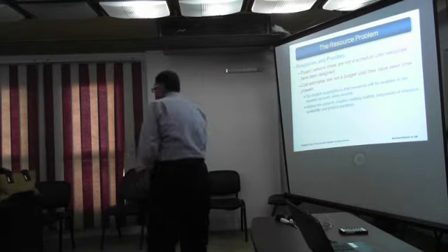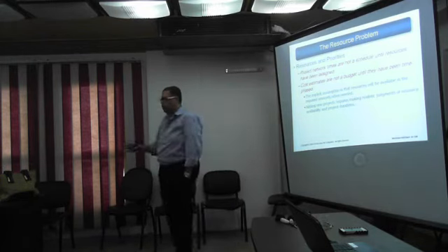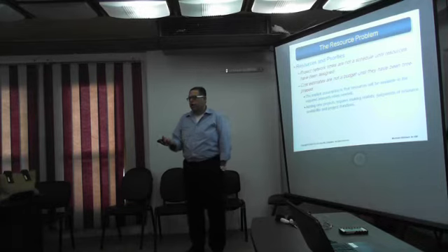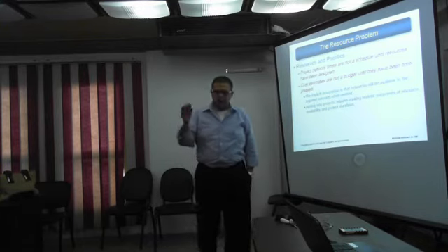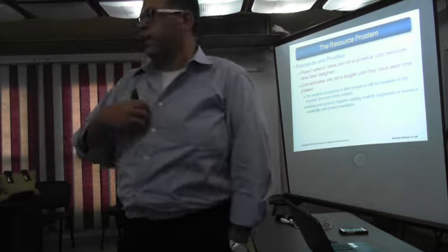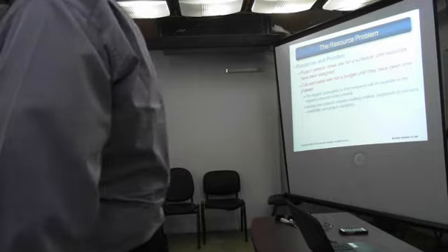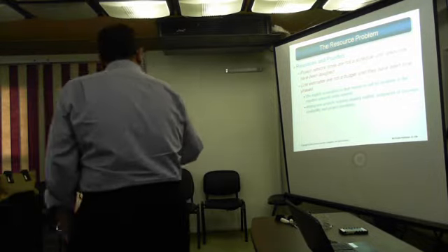I'll assume that all the resources needed are only people. Okay, for example, basically you need to have your schedule. Your schedule means that you have a lecture today at 10 a.m. Okay, if you know that the lecture is today at 10 a.m. without assigning a resource for this lecture, which is me as an instructor, then it's just a network plan. We cannot consider it a schedule because you don't have resources assigned to it. That's why we need to assign this resource.